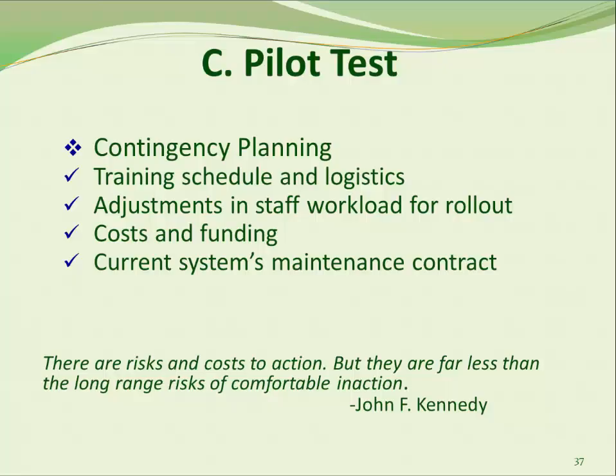A contingency plan is a very important component of the test plan. All stakeholders must have an opportunity to provide input to the contingency plan in advance of testing, helping to define comprehensive go, no-go criteria.